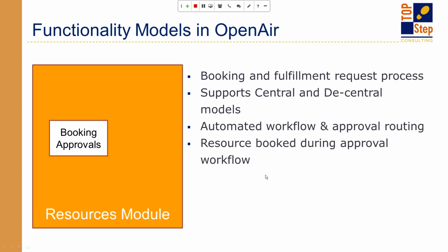Okay, let's talk about booking approvals. I think of booking approvals as sort of like the next generation booking request. This allows you to request a booking in a workflow that is a little more similar to, say, a timesheet approval process versus the booking request itself. You create a booking and it sits in a pending or requested status, but that booking is still there. Like manually creating bookings, the booking exists, it's affecting that user's schedule. Anyone who wants to use that user can see their availability immediately.